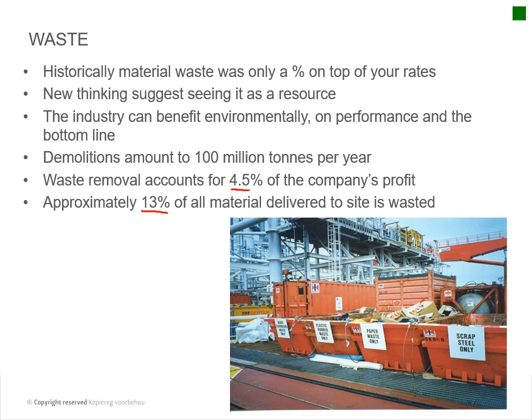That 4.5% — if you're working on a million-rand project, that's more or less 45,000 rand which you could have saved. Other items you can manage well include your site offices. If you manage your tools and sheds efficiently, the fewer containers you have on site, the less your overheads per day. If you plan your site such that you use some of the constructed building as storage, you can save that cost as well. There are a whole lot of practical items you can think of to save money by utilizing your progress on site.